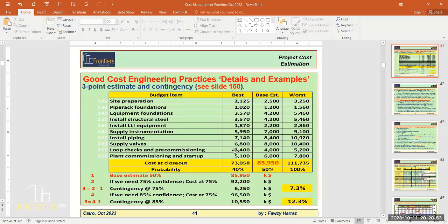The thing is, as I said, did you get quite odd bids from the contractor compared to your estimate? Yes, unfortunately, yes. There's a huge spectrum. There was more than 25% variation, and it did not come with the civil works. It came with the electromechanical and the other disciplines. Yes, because the definition of this is very limited during the concept development. Exactly, this is why I was asking. It was very immature in the preliminary design.